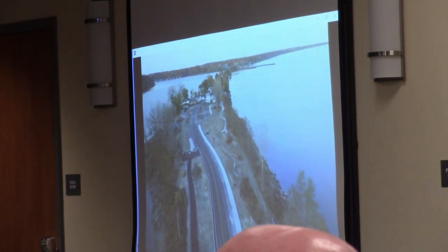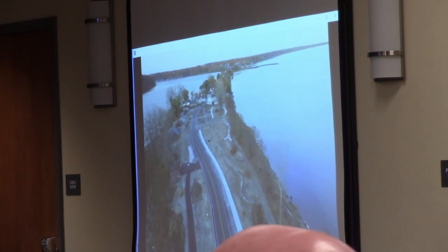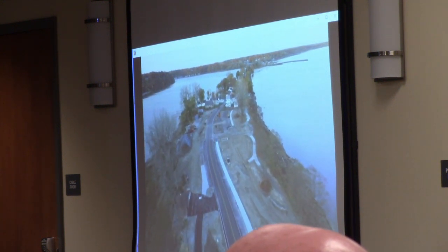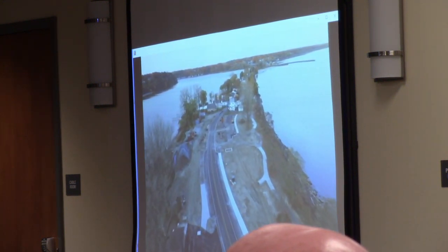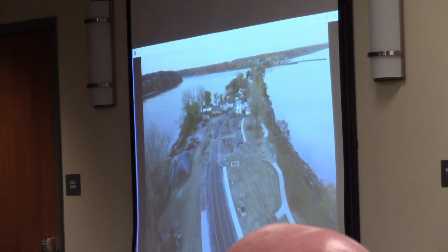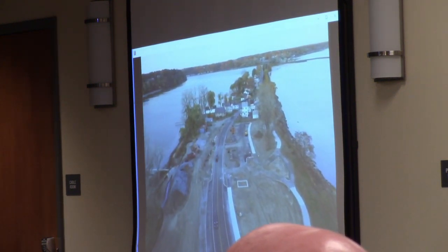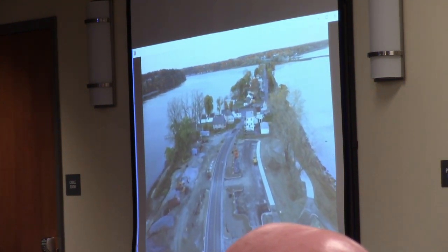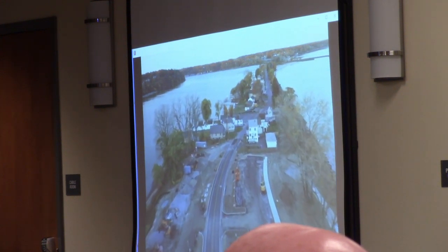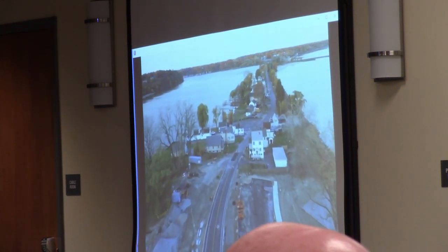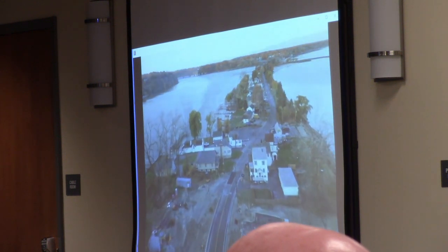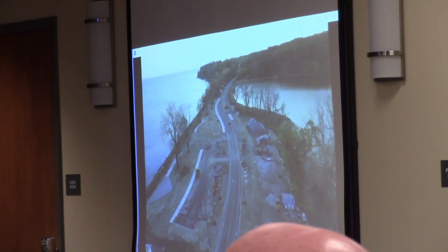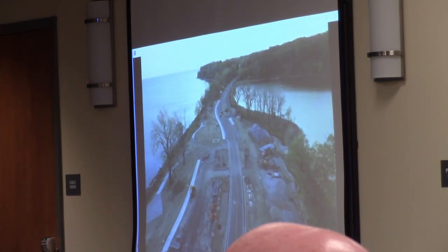So you can see most of it is in, but the connectors and ramps to get onto it, leaving out just so no one tries to use them. And then on the north side, the lake side, you can see all the concrete that is in, and then certain areas that were intentionally left out so that we can move equipment through the park with some of the next aspects of work that have to get completed in that area. And then that triangle on the north side is obviously where the shade structure will reside.